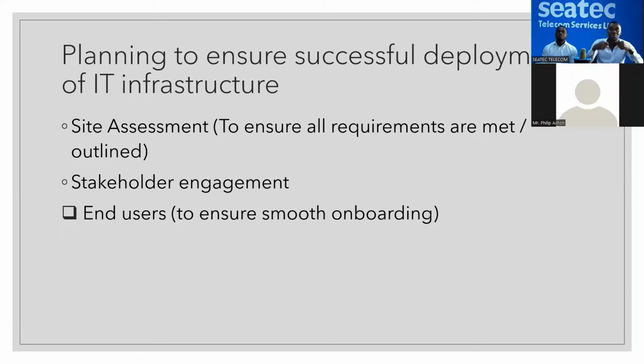This informs you properly so that when you are deploying, they know, oh, today I'm supposed to leave my office for 10 minutes for them to come and fix something. I'm supposed to move this way. They are going to be coming into the office. So this is very important to planning. It makes you have a smooth deployment.